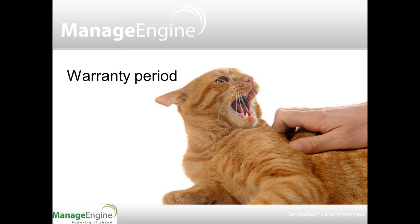But so we want to have a warranty period. We want to have a transitional time after the system goes live where the project is still responsible for that system. Now we're getting better at this, and it's becoming quite common for projects to have a warranty period. But there's a couple of issues that come out of it. One of them is that projects have a finite amount of money, and so warranty periods tend to be a finite, explicitly defined period, like 1 month or 3 months. And if the system's still rubbish at the end of the warranty period, that doesn't matter. The project still disbands and goes away. So while the warranty period is good, there's still no onus on the project to ensure that the system does meet all the standards at the end of that warranty period.